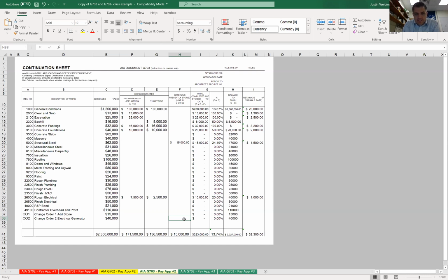Here's subcontractors' bids, especially if it's on a CMGC or a cost plus, where those bids or where the numbers are a little bit more open. You're showing your books to the owner saying, here's what our subcontractor billed for, here's the backup, and we're happy to show you that. On a traditional method or hard bid, you wouldn't show that information to the owner. They don't get to see that information. You just bill for what you're doing on a percent complete basis.